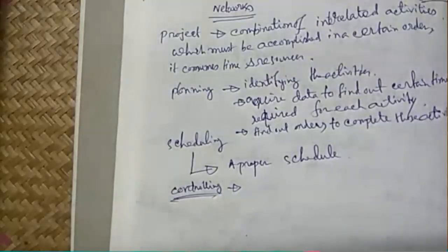I'm coming from the planning phase again. The planning involves setting the objectives of the project as well as any assumptions to be made. It also involves listing the tasks, jobs or activities that must be performed in order to complete the project under consideration. In this phase, cost estimation and duration of various activities, and the manpower, machines, materials and resources required are also to be determined.